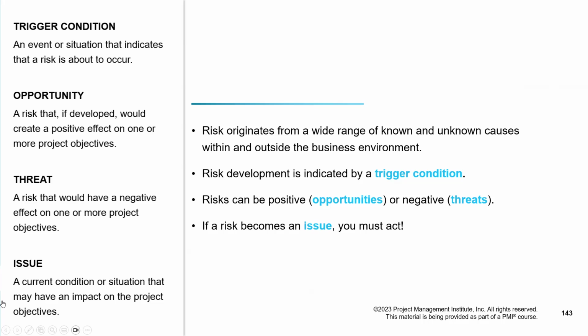All the action on risk should be taken before it has become an issue, because all actions after the risk has occurred will be treated under the heading of issue management. That is no more risk management. Risk management is done and dusted. Therefore, all the action on risk must be taken while the risk is still alive. Risk could be negative or risk could be positive, which I have mentioned already. The positive risk is called an opportunity and negative risk is called a threat.